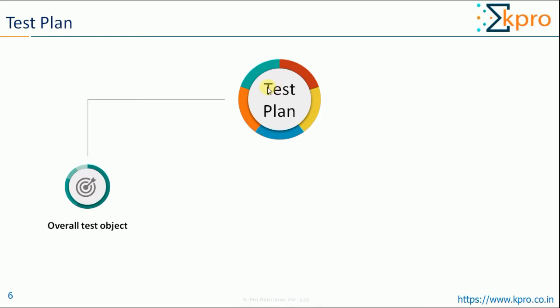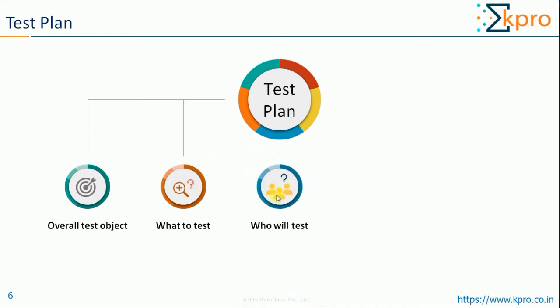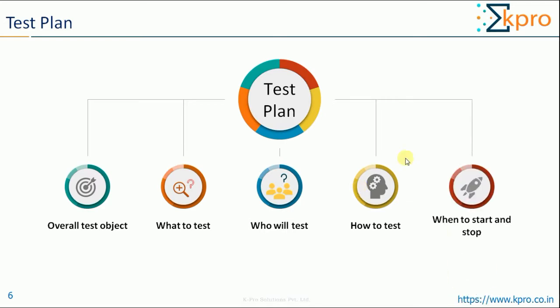It defines the scope of the project. Along with that, it also clearly mentions out of scope items and features which will be tested very clearly. The test plan document also includes team members along with the tasks they will be performing. It describes the test approach for different kinds of testing. It also includes possible risks and a mitigation plan for them.